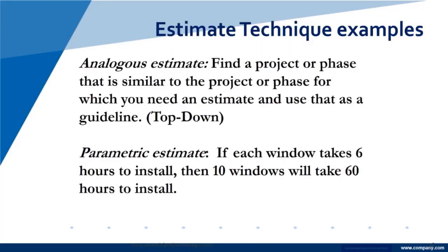We have parametric. I'll read the slide. If each window takes 6 hours to install, then 10 windows take 60 hours to install. It's simple algebra. Parametric is algebra.